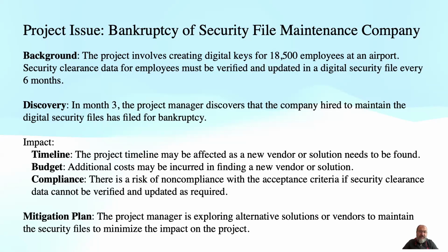Here is a significant issue that impacts the project in several ways. Firstly, the timeline of the project may be affected as you need to find a new vendor or solution to maintain the security files. Secondly, there could be additional costs incurred in finding and transitioning to a new vendor or solution, impacting the project's budget.